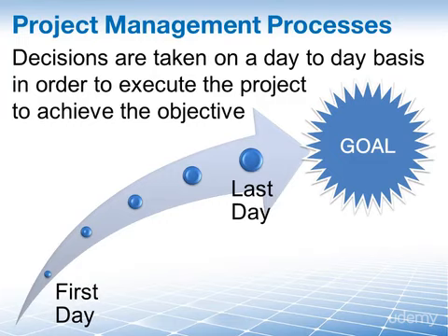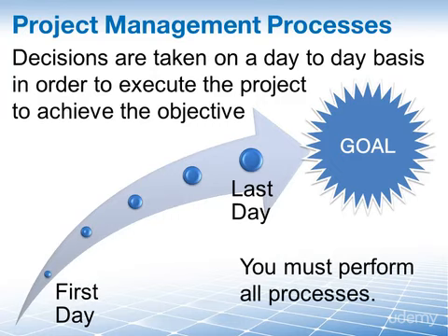art of that isn't. And while we're talking about the processes, for the exam, it's important to realize that you must perform all the processes outlined in the PMBOK guide. You cannot simply cut out a process here or there just because it looks like you don't need them on your project. Instead, the idea is that the project management team decides how much and to what depth each process will be used.